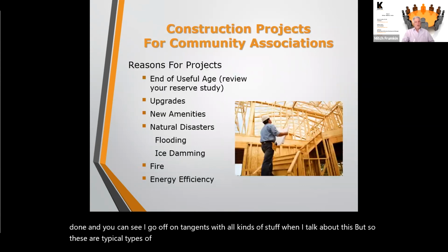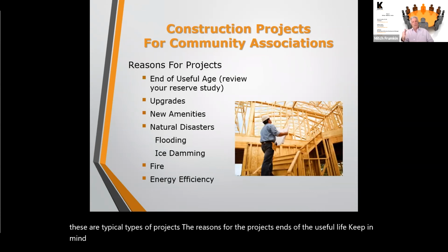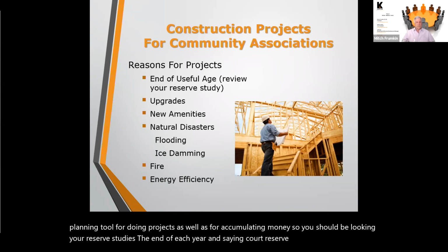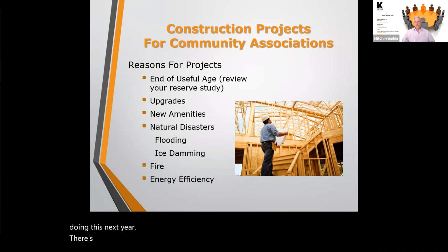The reasons for the projects: ends of the useful life. Keep in mind that a lot of people don't use the reserve studies as a guide. The reserve study is a planning tool for doing projects as well as for accumulating money. So you should be looking at your reserve studies at the end of each year and saying, according to the reserve study, we should be doing this next year. There's a reason why it says it in the reserve study, and it's because of the end of the useful life. Review your reserve study. Upgrades.